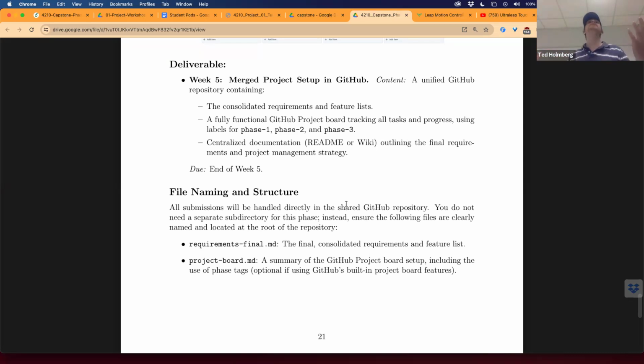So you get access to what everyone has contributed for the second week when it comes to creating your interviews. By the time you're done with the second week, you should have these interviews that allow you to stretch out the user stories. Initially, the user stories are going to be shallow, but your job through the interview process is to harden them and make them much more detail-oriented. And the week after that, you're going to decompose that set of user stories, now refined, into a set of features that the application will have to offer.